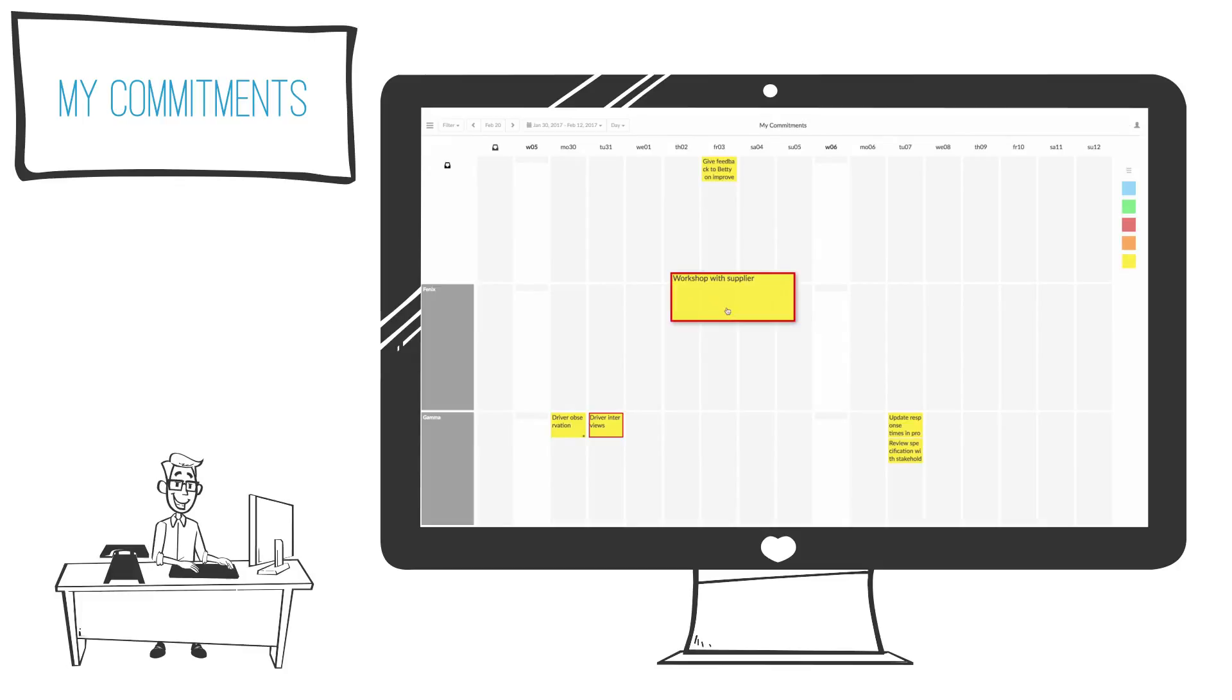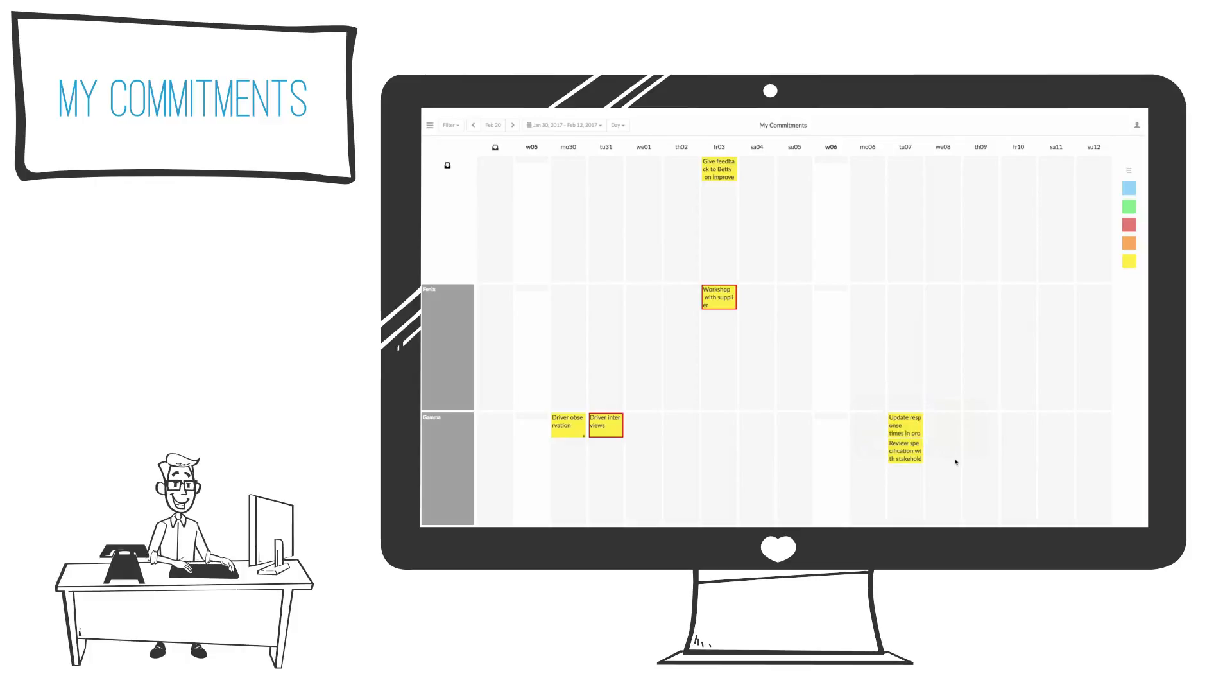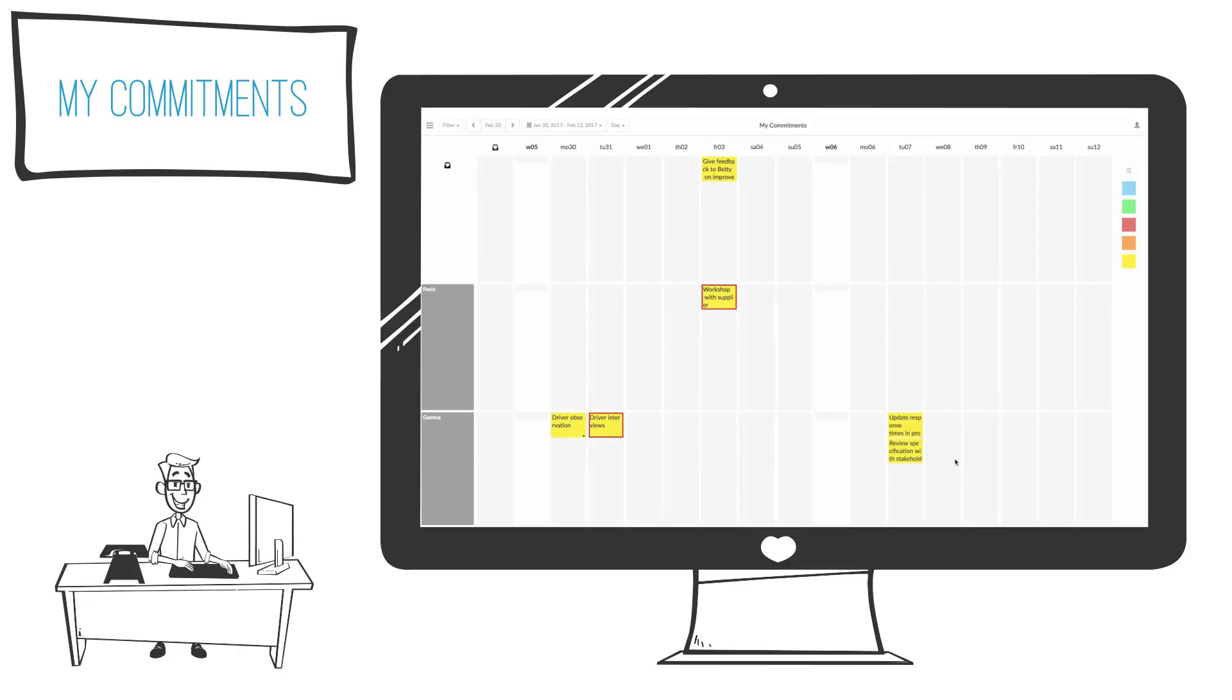This is Jonas's personal board which is automatically compiled based on his commitments where each row represents a source of commitments. We can see that Jonas has commitments in two projects, Phoenix and Gamma, and he also has commitments outside of these projects related to activities planned on the board for the engineering group to which he belongs.